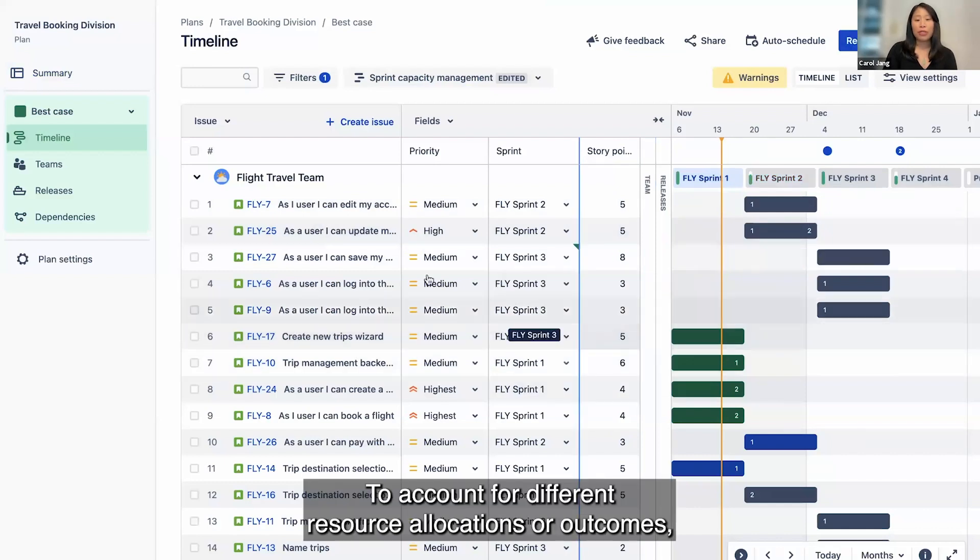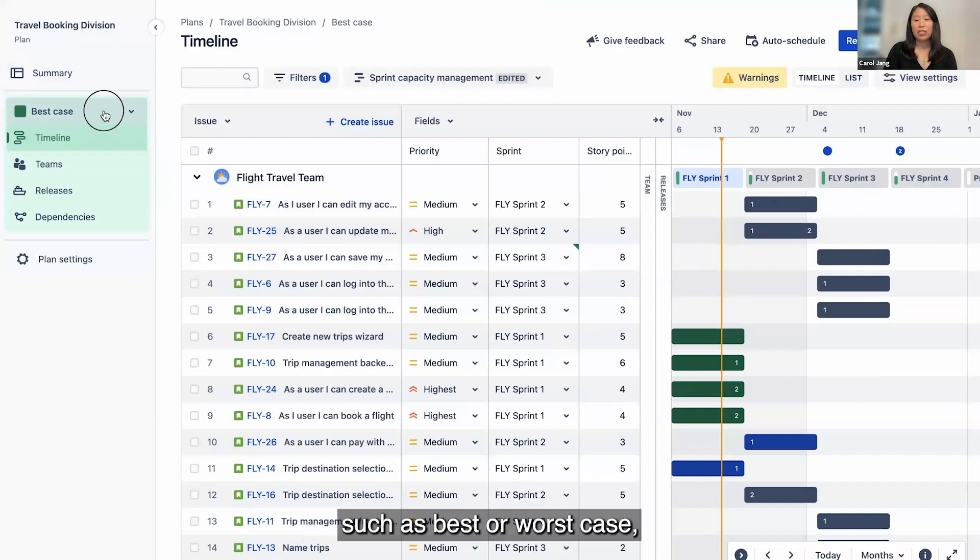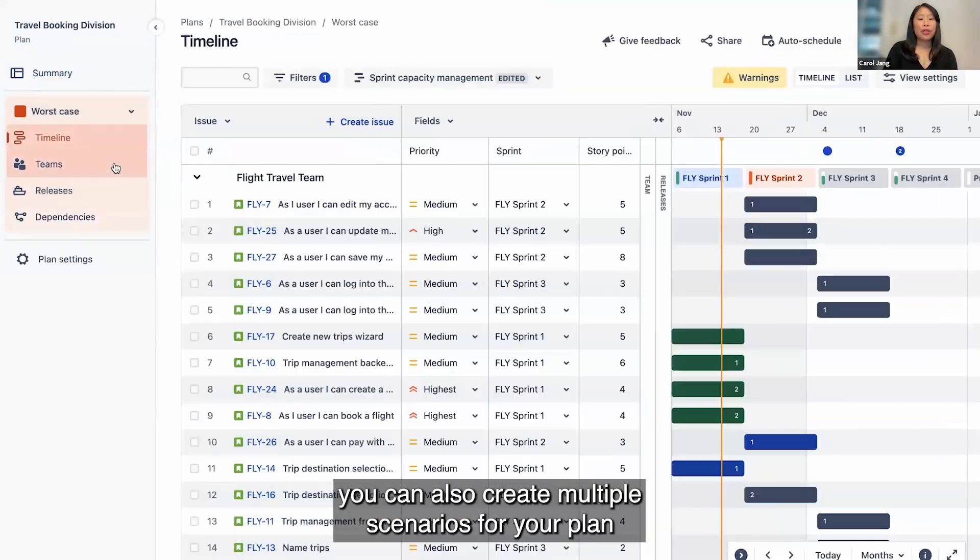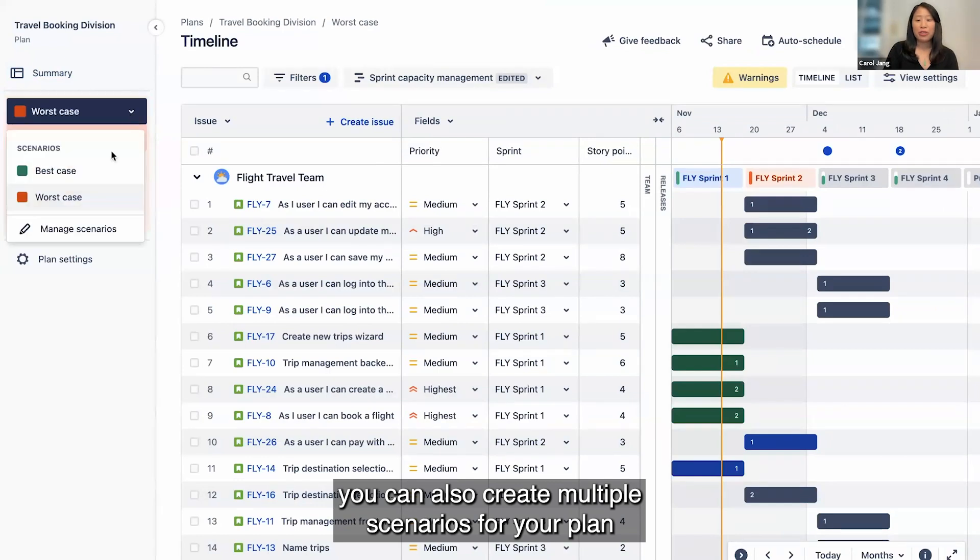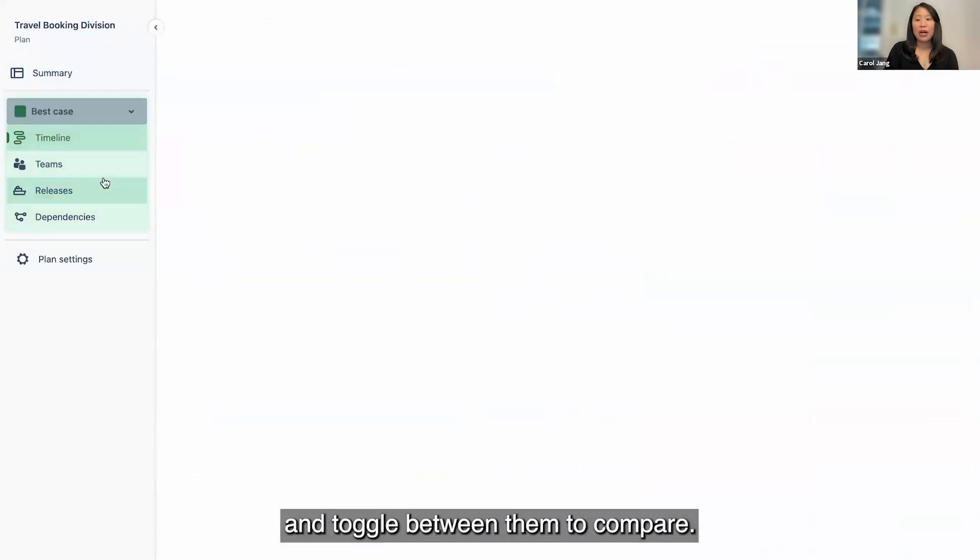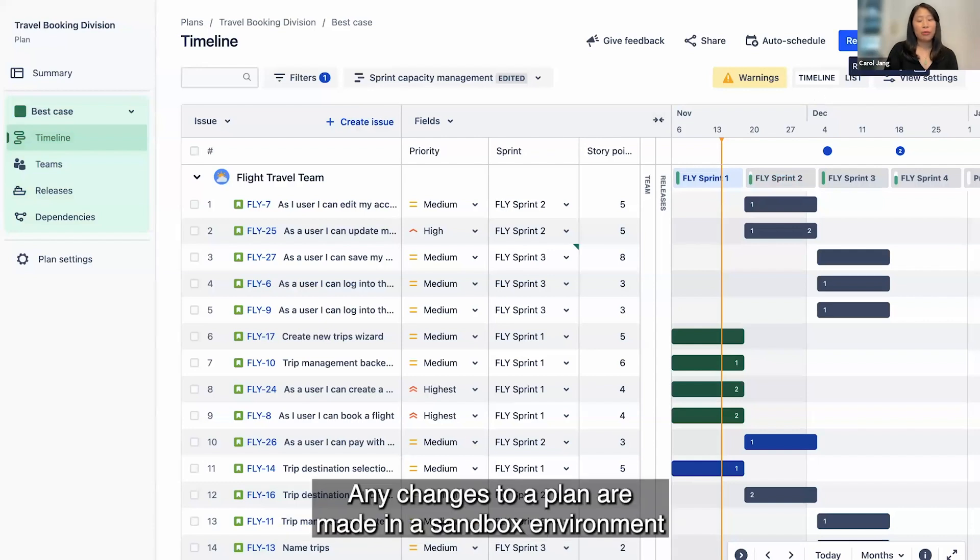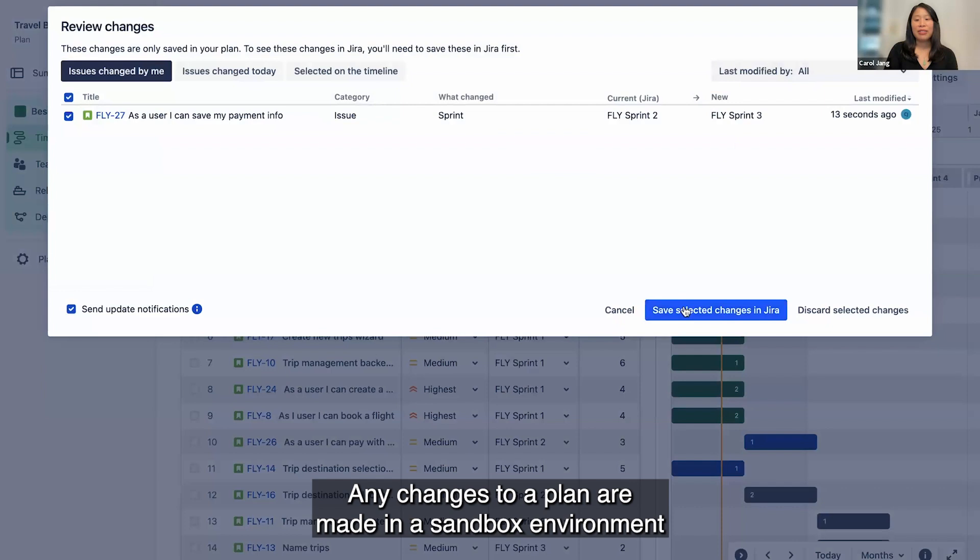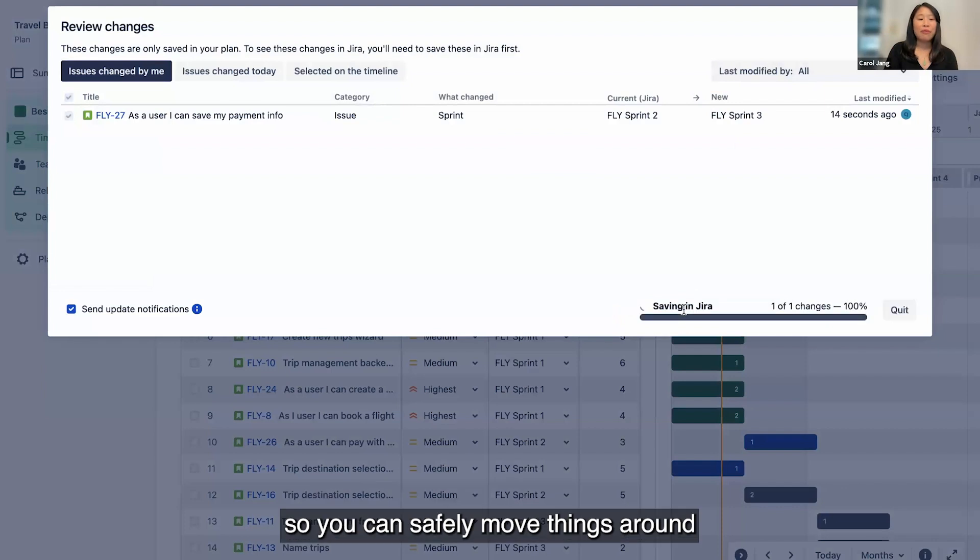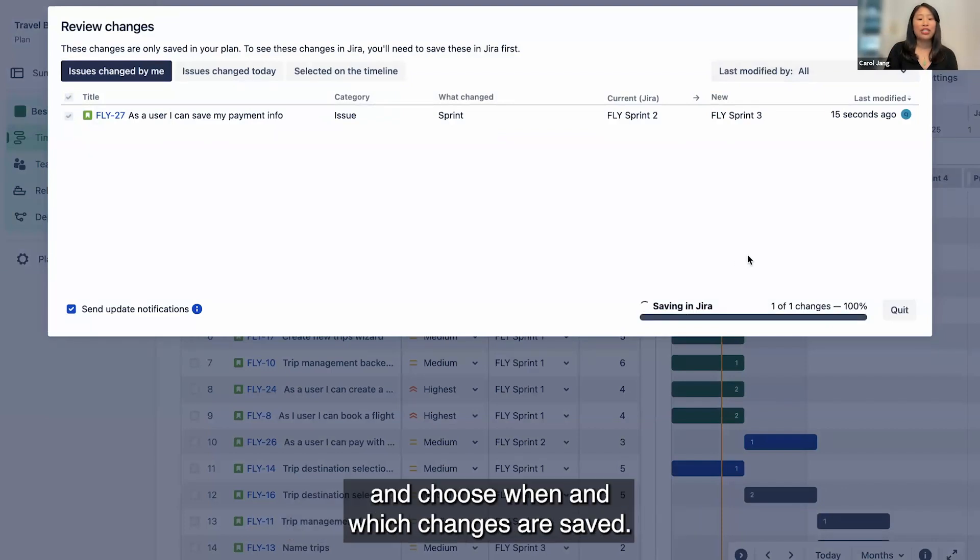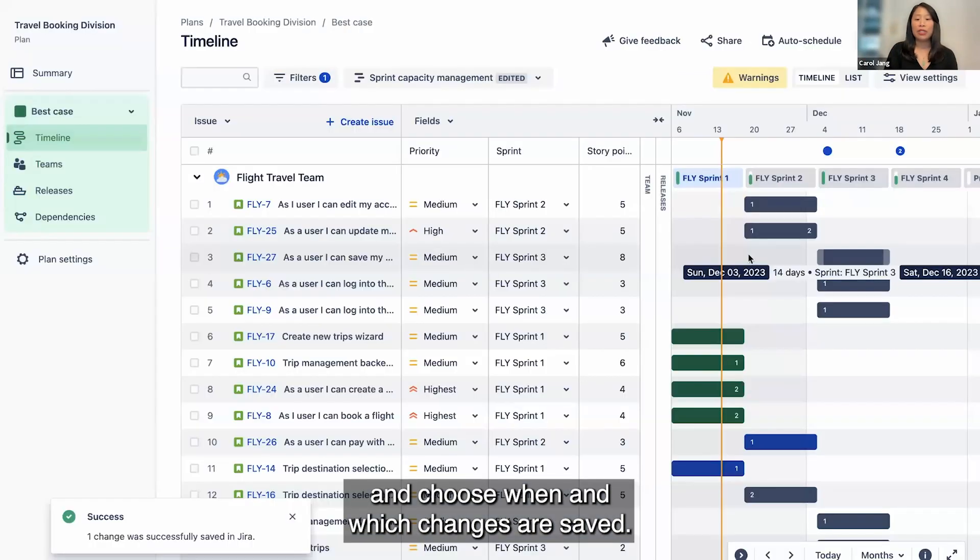To account for different resource allocations or outcomes such as best or worst case, you can also create multiple scenarios for your plan and toggle between them to compare. Any changes to a plan are made in a sandbox environment so you can safely move things around and choose when and which changes are saved.